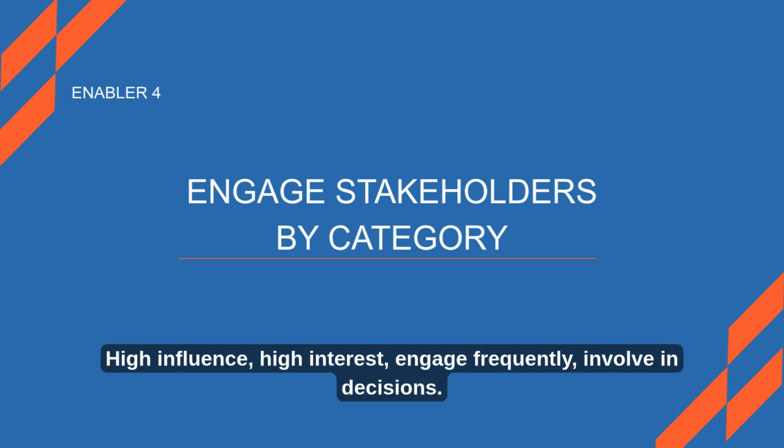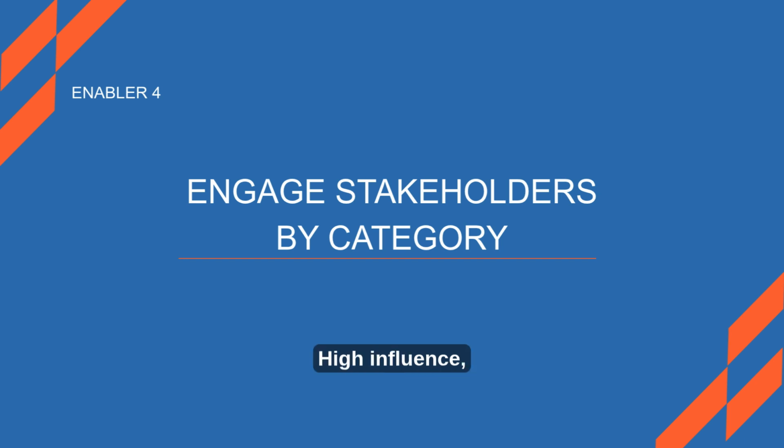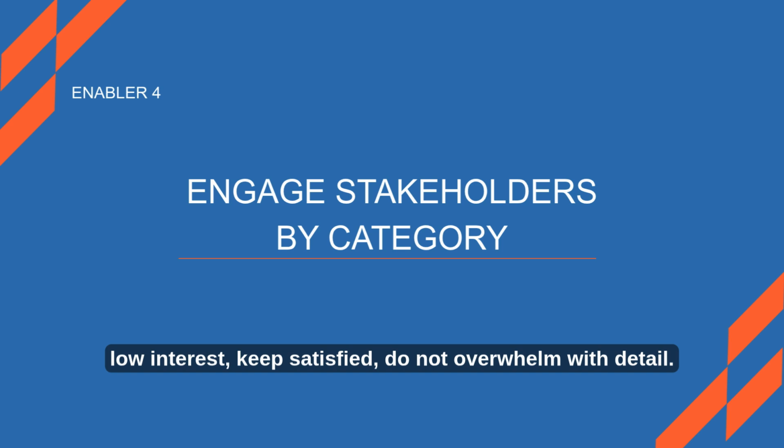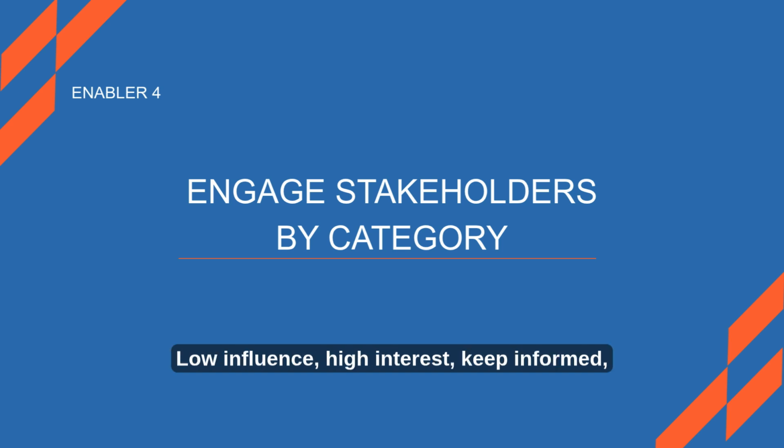High influence, high interest: engage frequently, involve in decisions. High influence, low interest: keep satisfied, do not overwhelm with detail. Low influence, high interest: keep informed, respond to their questions. Low influence, low interest: monitor only, minimal engagement.